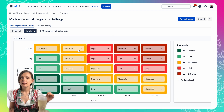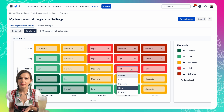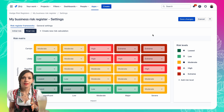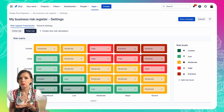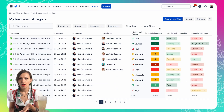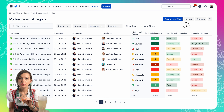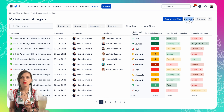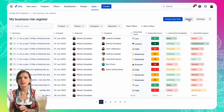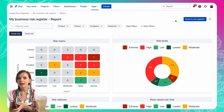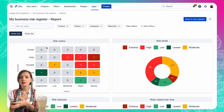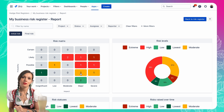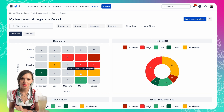Usually you should deal with the risks with the highest risk score and risk level first. There is an option to customize your risk settings, risk score metrics, and risk matrix if you would like as well. On top of that you can also track the progress of each risk and the mitigation plan.